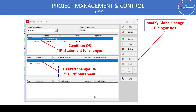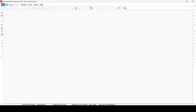The 'Else' statement is optional — you can apply changes there or keep it empty. Normally, if the condition is met, the 'Then' statement applies the changes; otherwise, the other activities that are not fulfilling the condition remain unchanged. The Global Change dialog box basically contains three statements: If, Then, and Else. The If statement is quite similar to the filter statement when filtering activities — the conditions are the same.